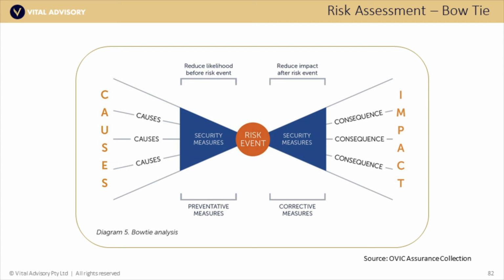And so you get this model where these bow ties cascade into each other. If you picture that as a connection of bow ties, probably at least 2 levels of them, one leading into a second, you end up with probably about 5 or 6 key risk scenario events, no matter what happens in the broad list of causes. The impacts are probably only about 4 or 5 key impacts for your business that create the catastrophic risks for you, which backs up what I was saying about inherent risk. That inherent risk is typically the catastrophic failure of a substantial part of your control framework. Major outages and major data breaches are often to do with a fairly catastrophic failure of a couple of key controls at least. This model might be useful for you to have a go at to explore it.